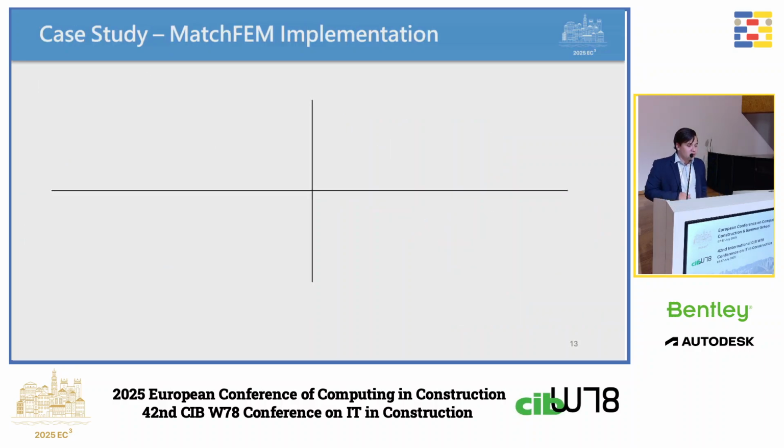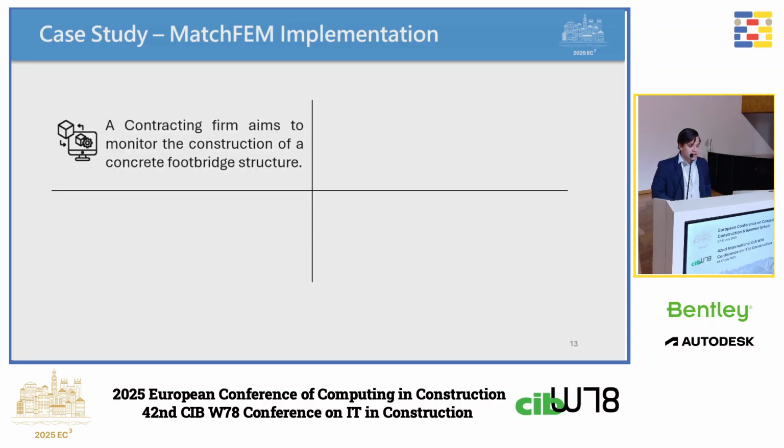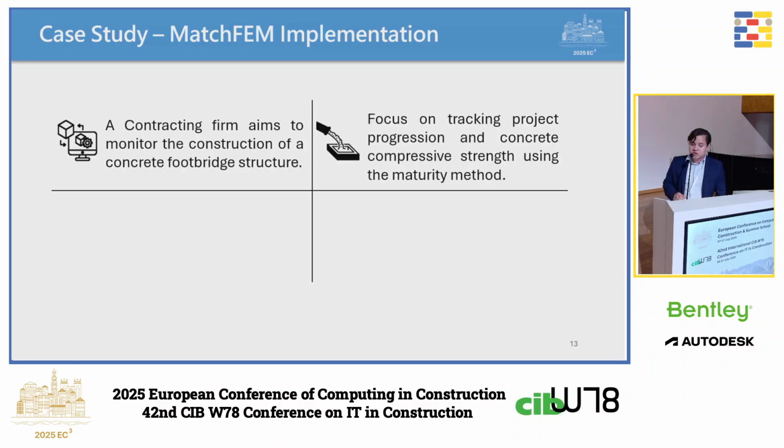Okay, so now that we have explained in general the characteristics and functionalities of MatchFEM, let's get into a comprehensive case study of MatchFEM implementation. Let's imagine that we have a contracted firm that aims to monitor the construction of a concrete footbridge structure, with a focus on tracking project progression and concrete compressive strength using the maturity method. This method allows us to predict the compressive strength at early ages, measuring on-site temperature data.